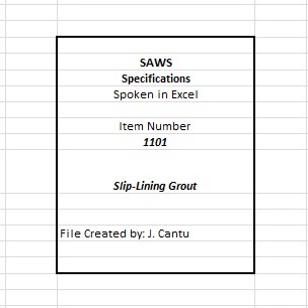K. Bulkhead designs. L. Buoyant force calculations during grouting. M. Flow control. N. Provisions for service connections. O. Pressure gauge and recorder certifications. P. Vent location plans. Q. Written concurrence that the contractor has coordinated this work with the grout installer and the liner pipe manufacturer.